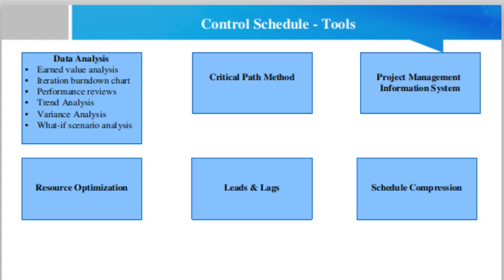For example, on a project to construct a new office building, the landscaping can be adjusted to start before the exterior work of the building is completed by increasing the lead time in the relationship. Or a technical writing team can adjust the start of editing the draft of a large document immediately after the document is written by eliminating or decreasing lag time.